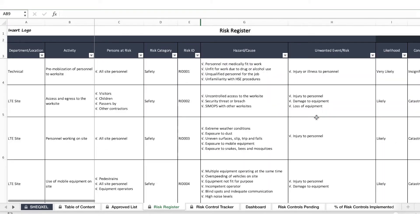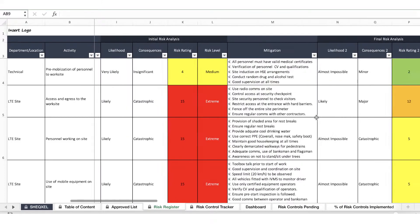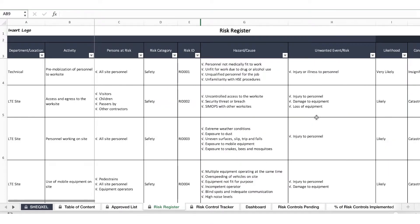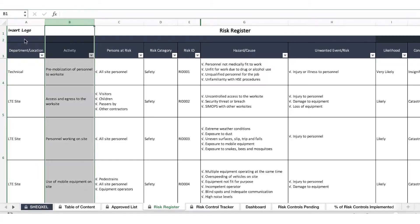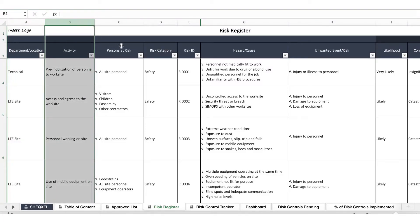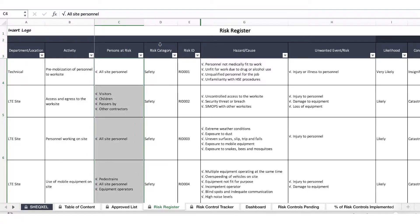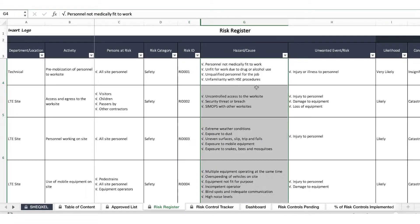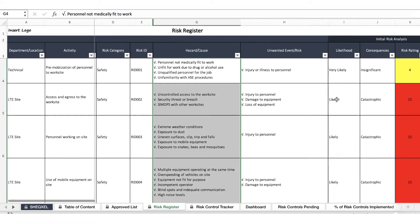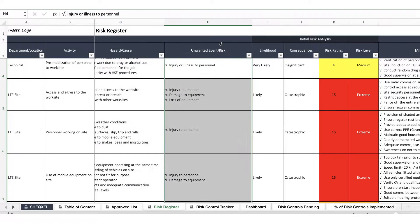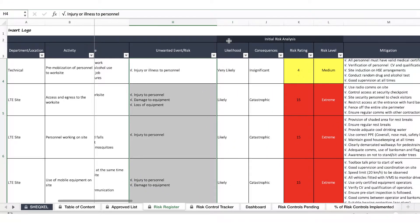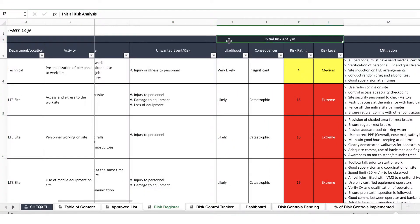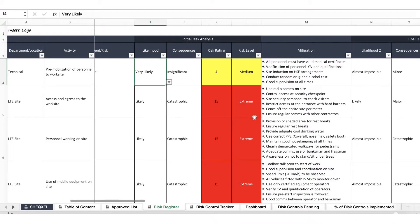That is done effectively by doing your hazard identification and risk assessment on a risk register. We have a very structured approach for conducting your risk assessment by indicating your location, the activity, the person at risk, the risk category, the risk ID, identifying the hazards, identifying the unwanted event or the risk, and doing an initial risk assessment.